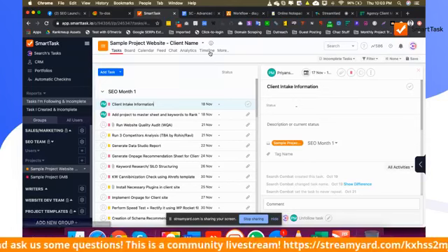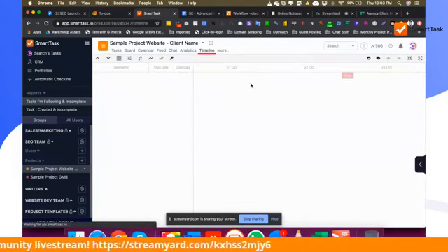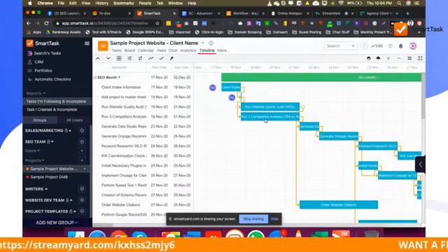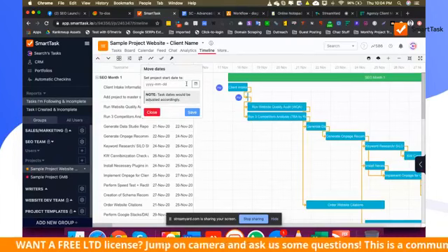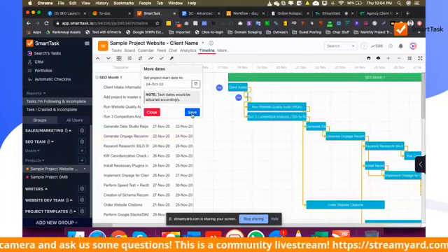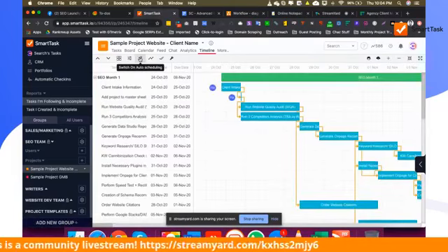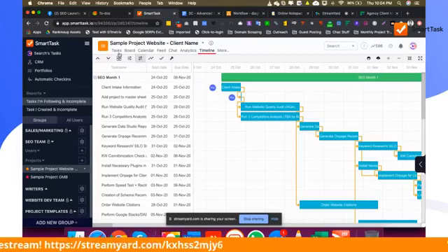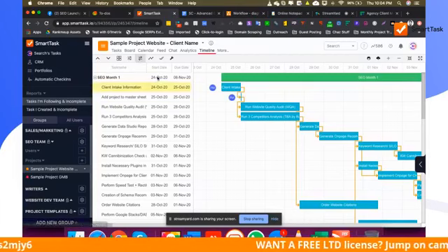Then I need to come to the timeline, which I can see now, because we took a good time to put all these dependencies together. So you can say, because we know how much time it's probably going to take for each and every task, let's say the task is starting on the 24th of October. The 24th of October, the thing's going to go in, and then auto sync, and boom, everything, all the guys are going to know what they have to do during this particular time.